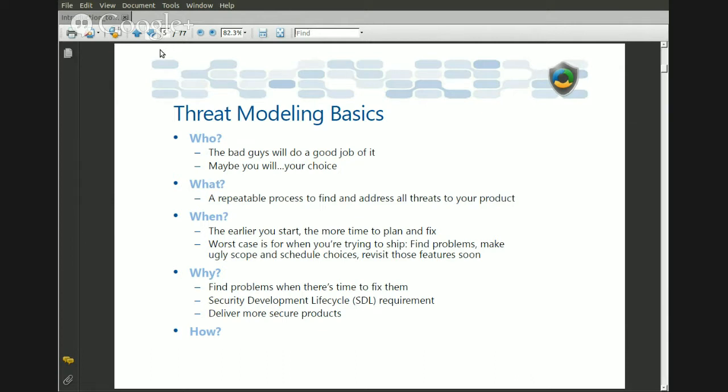So you have to move your schedule all the way back, and all that money you spent has to be spent again for additional testing, because now you have this other fix in the actual product. You have to test and make sure that fix actually works. So it gets really expensive. It's like building a house, and the pipes are incorrect after the house is built. Now you have to tear down all the stuff at the house and fix the pipes.